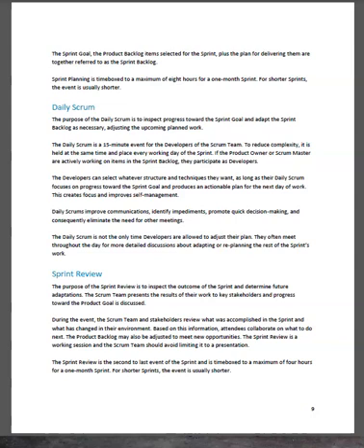They often meet throughout the day for more detailed discussions about adapting or replanning the rest of the sprint's work. Sprint Review. The purpose of the sprint review is to inspect the outcome of the sprint and determine future adaptations. The Scrum team presents the results of their work to key stakeholders and progress toward the product goal is discussed.